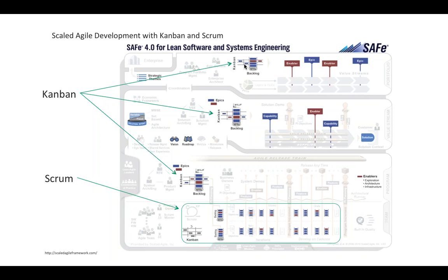The value stream level has its own Kanban board for their own capabilities, which are kind of like features but are aggregated higher and need multiple agile release trains. Program level utilizes a Kanban board for the prioritization of the features, and each team at the bottom on the team level has their own Kanban board for prioritizing user stories. And prioritization for each level is broken down like this.